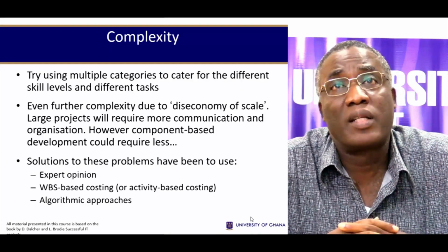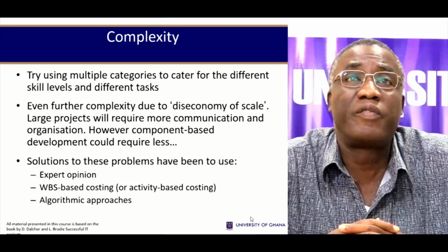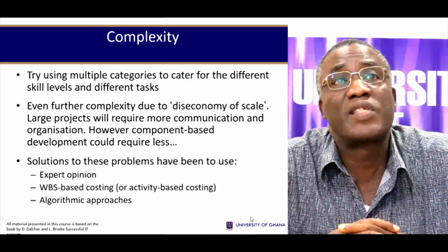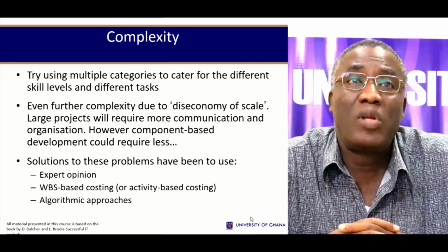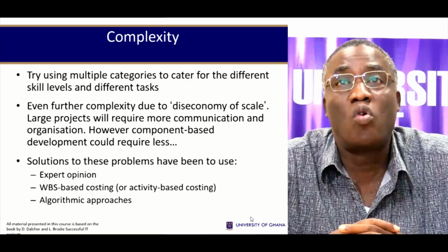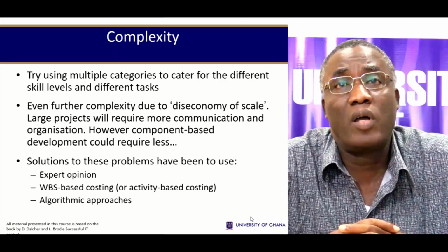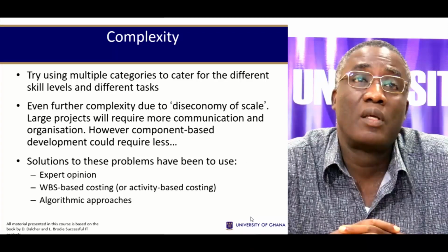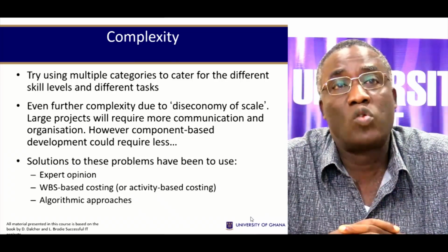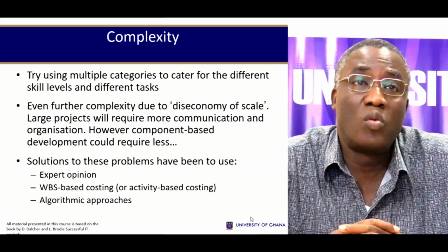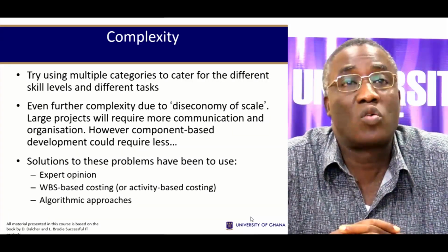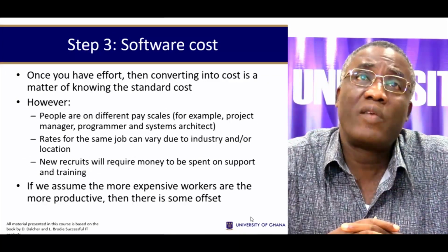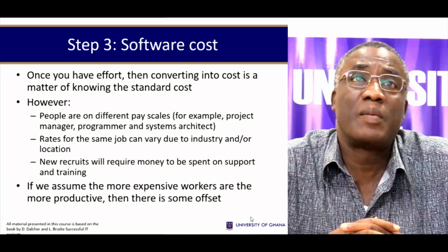We may try to use multiple categories to cater for different skill levels and different tasks. You can even get more complexity as a result of economy of scale. For example, large projects will require more communication and more organization. However, component-based development could require less of this. One way to go about this is to use expert opinion or use WBS-based costing or activity-based costing or algorithmic approaches.